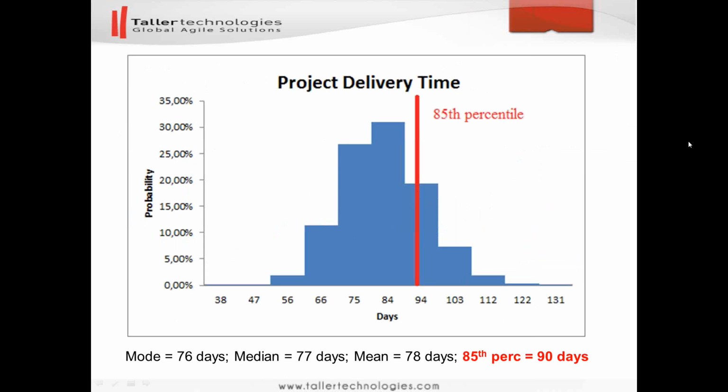The other question is, does one have to go through a stochastic model, or in other words, could one take the raw data and perhaps sample it more times to get the same kind of final output, or is an extra step of averaging necessary to get robustness in the solution? So another important part is that we are not using only averages. We are using distributions, and Monte Carlo is the method for summing up distributions or multiplying distributions or anything. And without Monte Carlo, we would end up using only averages, which will not give us the safety.